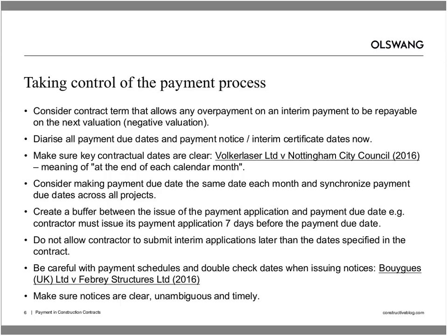The JCT has said it will embrace the UK government's Fair Payment Charter. The idea of this is to reduce the periods of payment, and we've seen a number of employers and contractors sign up to it. The JCT contracts have actually been generally pretty good about this. So we'll wait to see whether the Charter's other principles, such as the greater use of project bank accounts by central government clients or the removal of cash retentions, are encouraged.